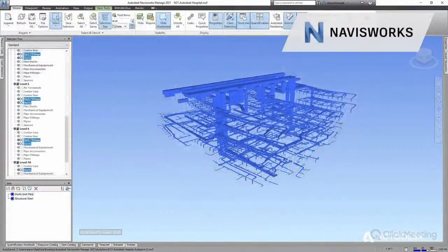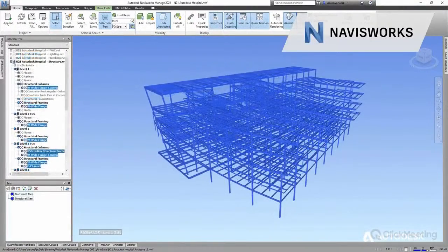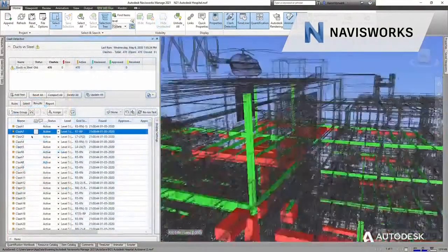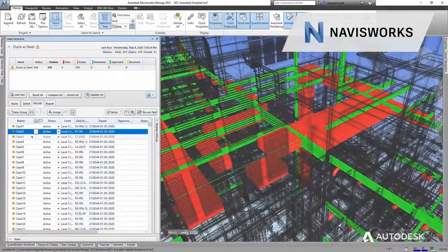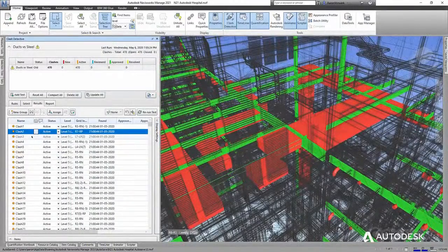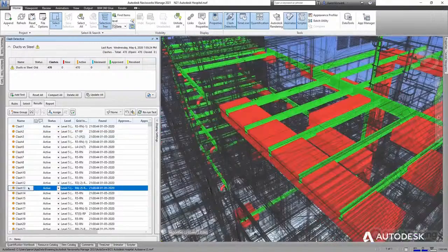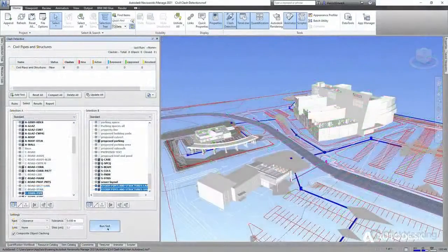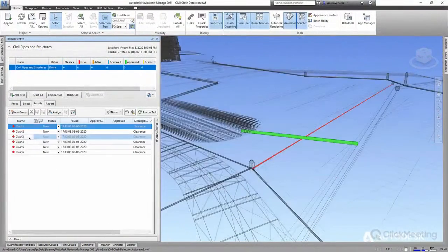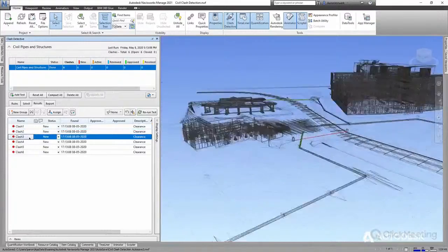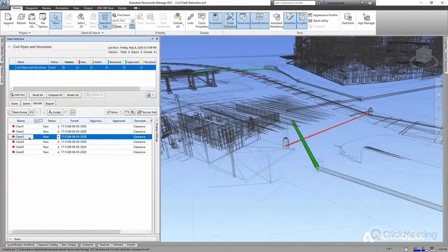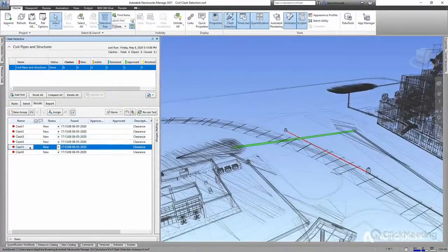During pre-construction, design teams and contractors can perform 3D clash detection on the building and site models in Navisworks. Together, the team can identify interferences between steel framing and mechanical ducts in the building, as well as between site utility networks in the infrastructure design, enabling resolution of any issues between design intent, constructability, and fabrication before construction even